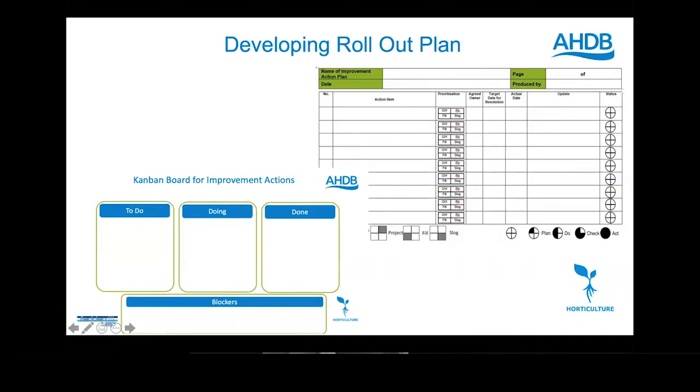So these activities would be items on the action plan, and I used to just write them down onto post-it notes. And once a week, I used to update it, and hopefully what you're seeing is the post-it notes moving across. So this is your backlog of things you've got to do. I've moved them across into, this is what we're going to do this week. And then once we've completed those items, I've moved the post-it note across to the done column. And hopefully you start to move across more and more of these post-it notes during the week itself.